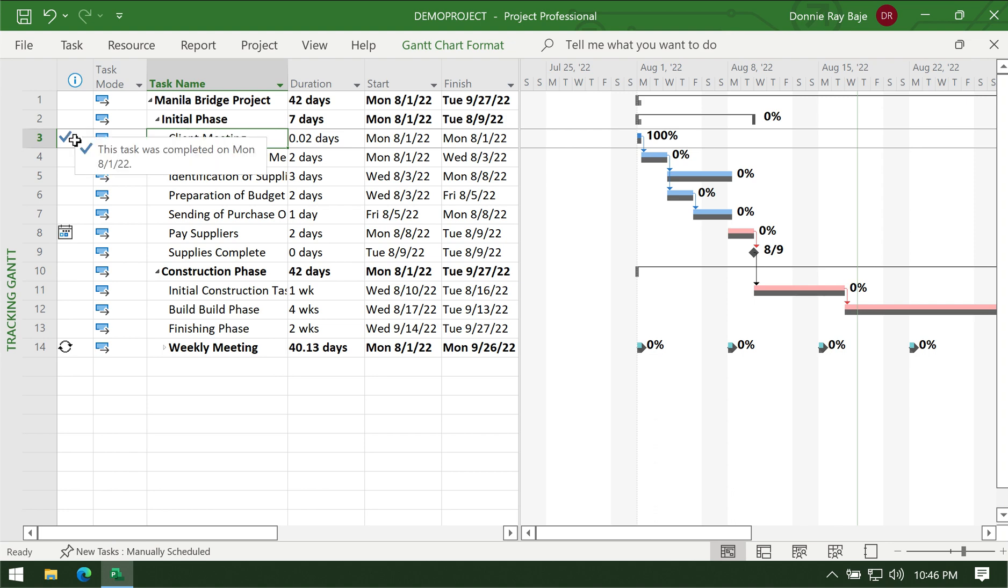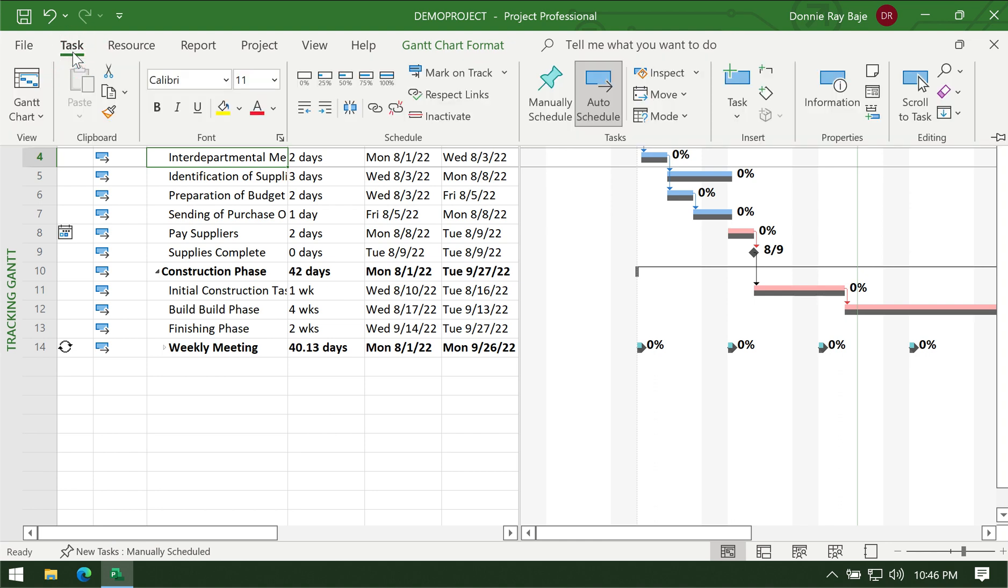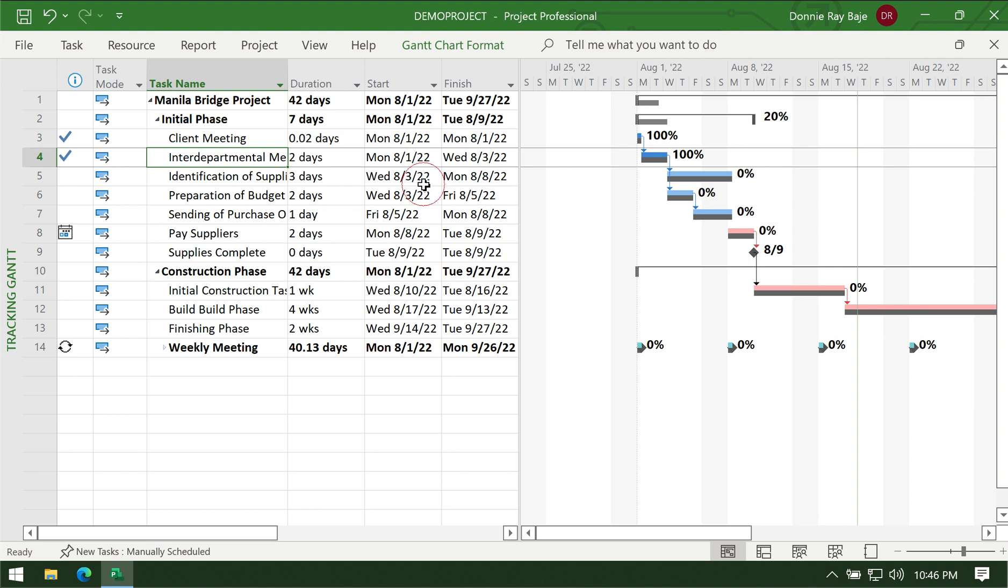Your Gantt chart will reflect that it's already 100% complete. You also have a checkmark on the left side showing that this task was completed on time. We have here interdepartmental meeting, we'll do it again, 100% complete. You will notice again that it already has a checkmark and the 100% is already plotted in the Gantt chart.